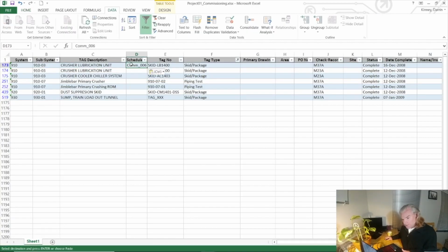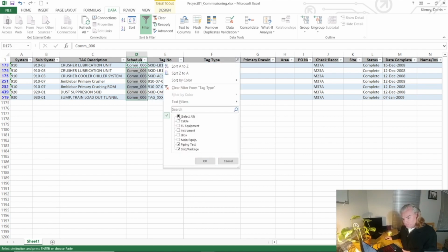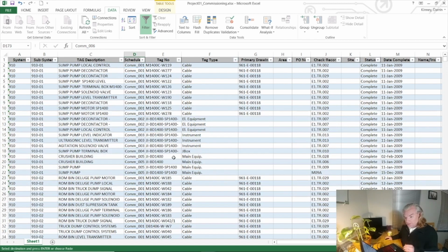Okay, so we've now built out our schedule to include some commissioning items. We've now added a new data set that we've actually called this table that now includes all my commissioning items, all my tag items, the descriptions, and I've got them all mapped into a schedule ID. Let's pull this all into, not Primavera, let's pull this all into Power BI.